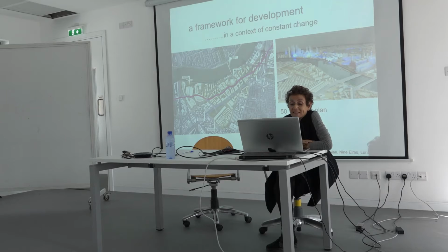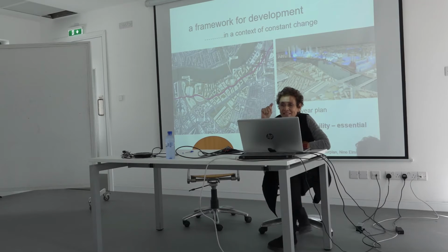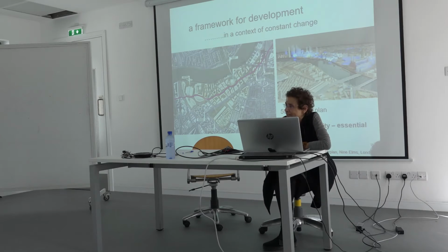Now, in Battersea, if you look at the master plan here to the left, what is delivered now is what is in the yellow line. And I would say the remainder of that master plan has another 50, 70 years. In other words, we're talking about a plan which might take a century. If the market conditions are not favorable and developers cannot build fast enough, it can take up to 100 years to mature if you want it to be delivered in full. So building in flexibility in these plans is absolutely essential.